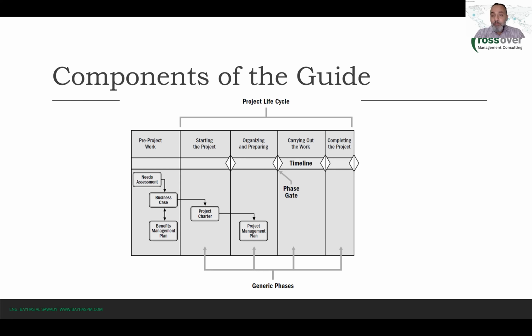So basically, when you create all of these subsidiary plans, the quality management plan, the resource management plan, the schedule management plan, the cost management plan, and every plan that you need, and you consolidate them, making sure that there are no contradictions, no conflicts between those subsidiary plans, then you have created what we call the master or the project management plan, which is a consolidation of all the subsidiary plans that you need to plan for in your projects, right?